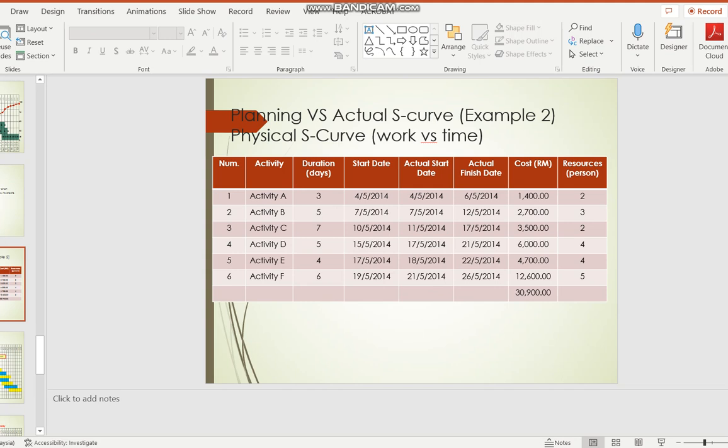All clients will ask you for an S-curve because they want to get the money ready, especially at the end of the year. If by December or by November their spending is up to a certain amount of money, then they will assume that they need to put in certain money, especially for government. If they don't spend the money that is planned for that month, at the end of the year the money will always be returned to the state finance ministry.